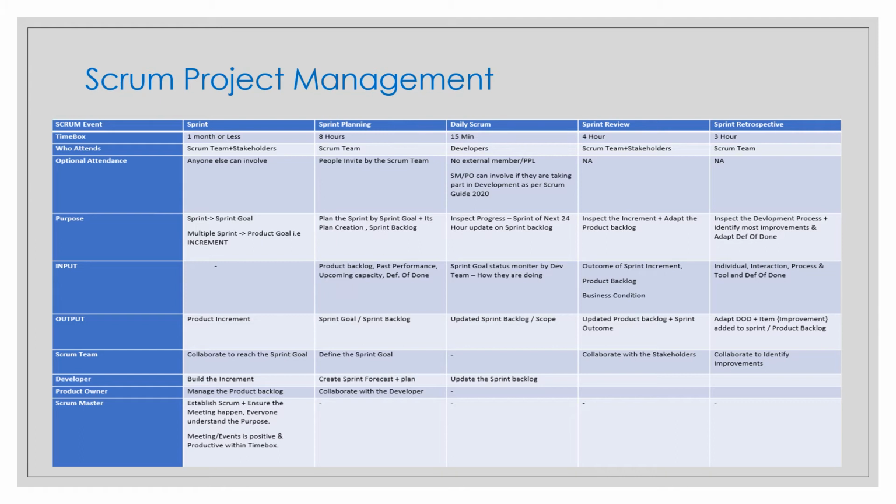For one product backlog item to be released to the user, it needs to meet the acceptance criteria, if they exist, and the definition of done. And the increment created from one or more PBIs also needs to meet the definition of done. The product backlog is managed by the product owner. The sprint goal is created by the entire Scrum team. These are all important from the exam or certification perspective.